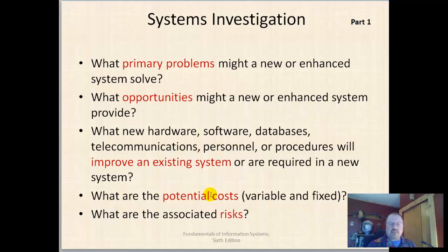What if that cost per gallon goes up to $4 a gallon rather than $3? They had estimated at $3. Okay, so that's a variable cost that is just really difficult to actually determine, and that's why with some projects you may have cost overruns. And I hope you see what I'm kind of thinking about with that.